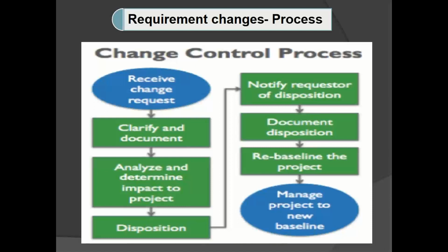So once after doing impact analysis, we are going to prepare a document and we will submit. In case it is showing any negative impact, we are not going to continue. If it is showing positive impact or no impact on other modules or requirements, then only we will continue.